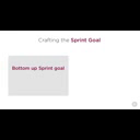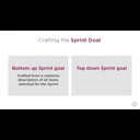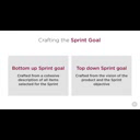Alan continues, sprint goals are either crafted from the bottom up or from the top down. Bottom-up goals are created by looking at the items selected for the sprint and then trying to build a cohesive description of what the net result of delivering those items will be. Top-down goals, on the other hand, are created by looking at the long-term vision for the product and then deciding which large step forward would be the most impactful to the organization. Either approach can be successful as long as the result has been crafted and agreed to by the entire Scrum team and it's a coherent statement of what the team hopes to accomplish in the next sprint.